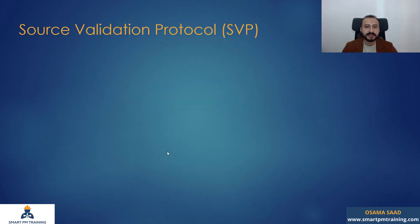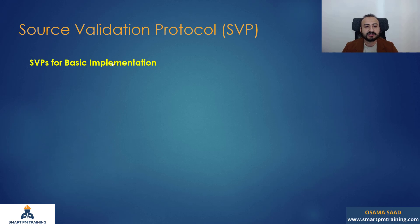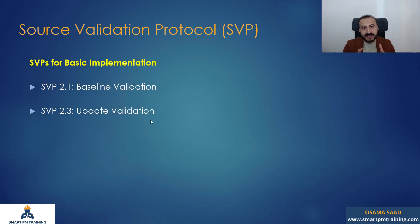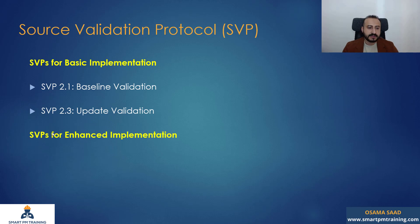What do we need to implement? The source validation protocols for basic implementation: 2.1 baseline validation. We need the baseline and the 2.3 update validation because we are comparing an update to an update. But in our first window, we are comparing the first update to the baseline, so that's why we need a baseline. For enhanced implementation, we need the as-built validation.